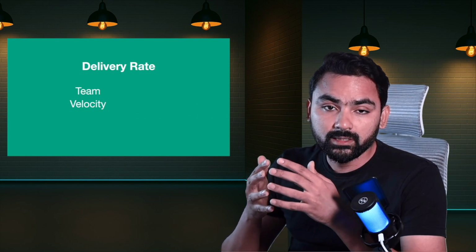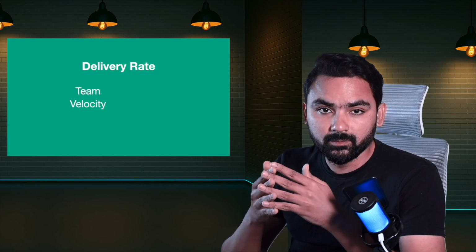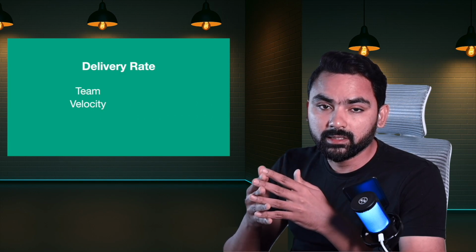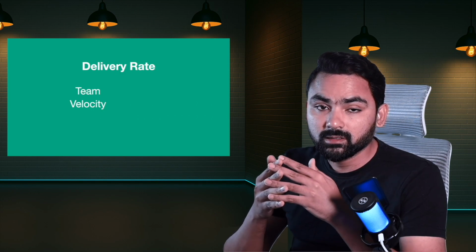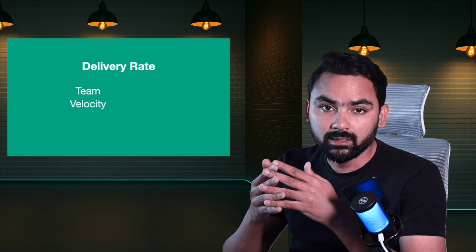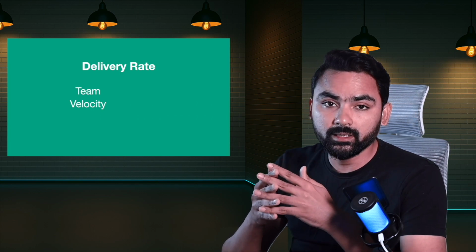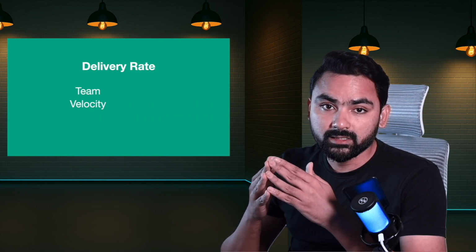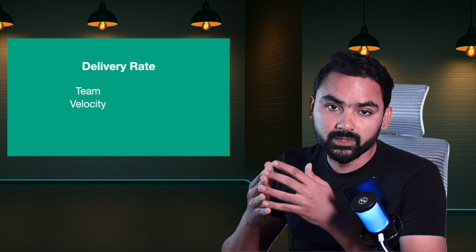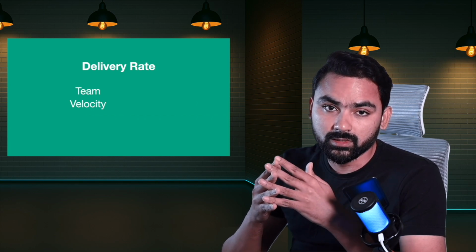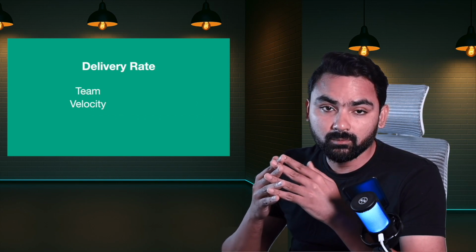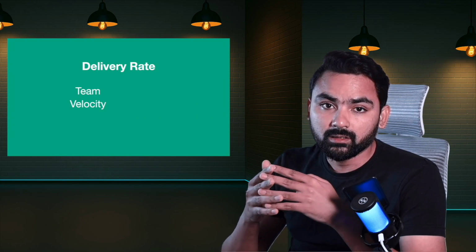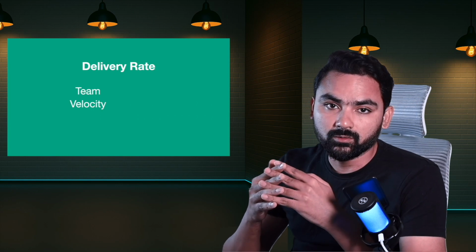We need to enforce the team's presence or active participation in the sprint grooming and planning sessions. This will enable the team to properly estimate the work that they are going to pick up in coming days and deliver. During these sessions, it is highly recommended that each of the team members participate in reviewing the complete description or requirements of the respective user story and highlight any blockers or challenges upfront, so that it won't block the development or it will avoid unnecessary spillovers which would impact the team velocity.